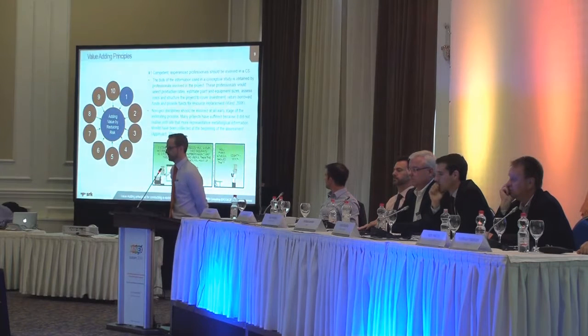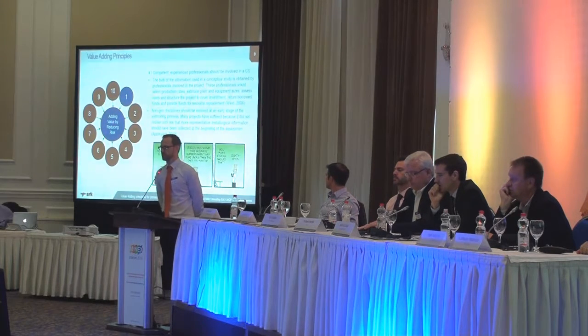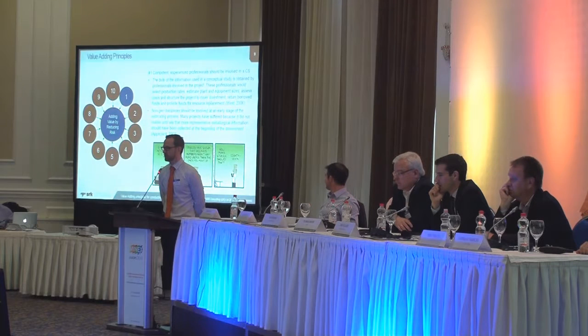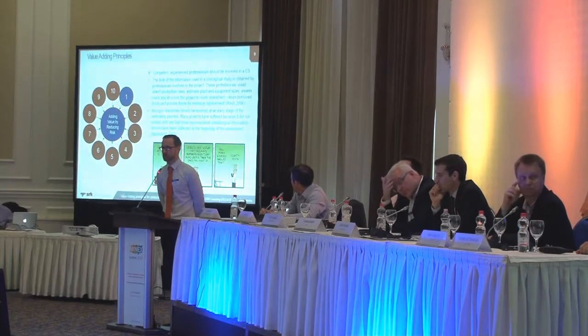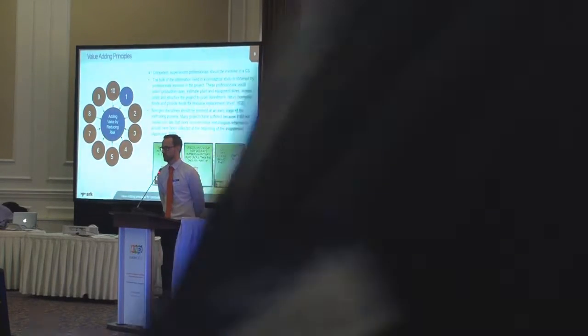So the first principle: competent, experienced professionals should be involved in conceptual studies. The bulk of your information is from professionals, experts in the field, knowing the mining tenure, the type of metal, and all of the risks associated. It's crucial also that non-geo disciplines be involved as soon as possible. Many projects have suffered because it was not realized until late that more representative metallurgical information should have been collected at the beginning of the assessment.